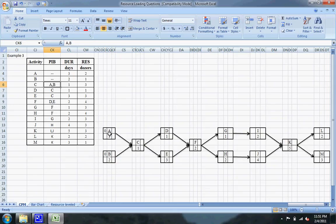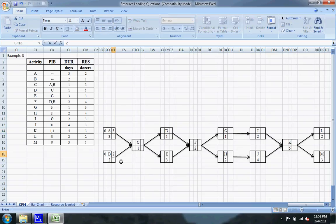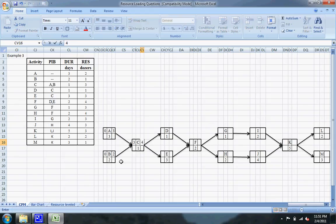I'm going to do the forward pass on this. You always start on day zero. For A, the earliest it can finish is on the third day, and B will be on the second day. Since C is preceded immediately by A and B, and A finishes after B, the early finish of A has to become the early start of C — so on the third day. The early finish on C will be the fourth day, and four will now be the early start for D and E, making the early finish seven on E and five on D.